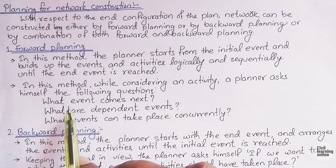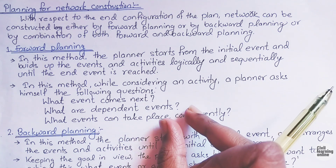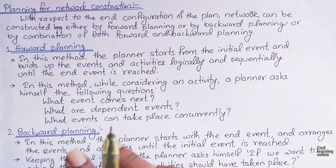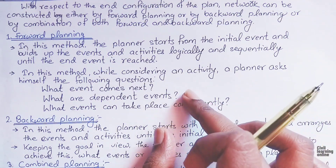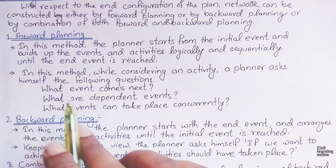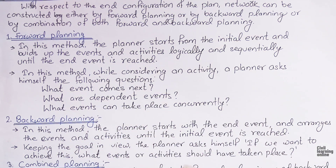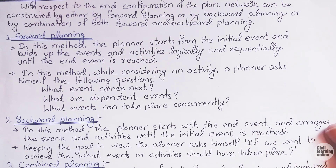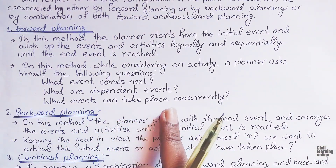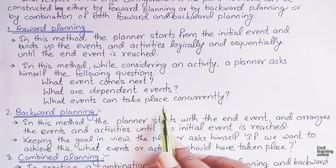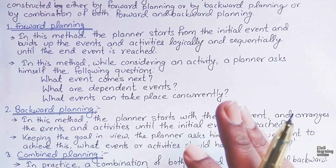While doing forward planning, a planner asks certain questions: first, what event comes next — we need to know what event to perform before starting any other activity; second, what are the different events to be performed while drawing the network; and third, what events can take place concurrently — we need to know what sorts of events can be performed together based on our experience.